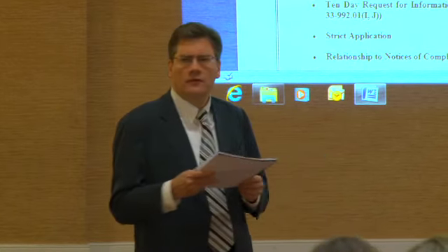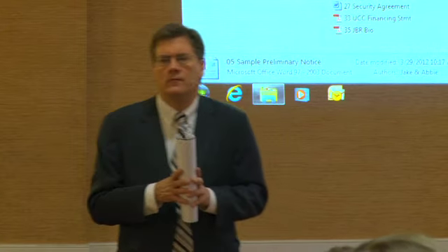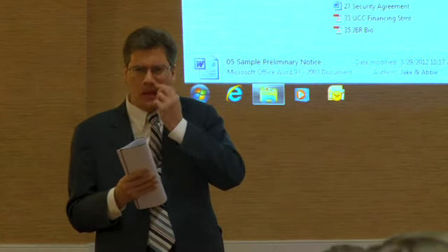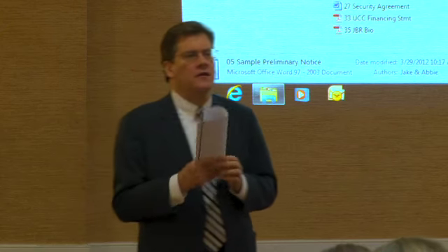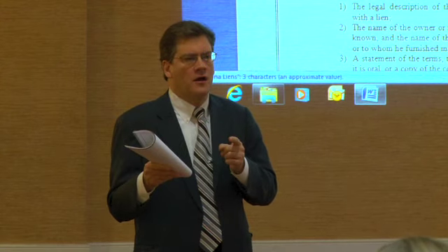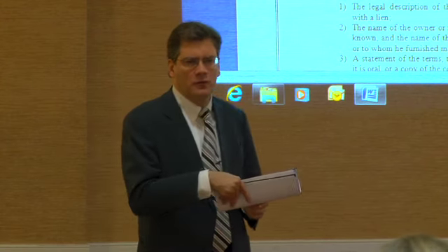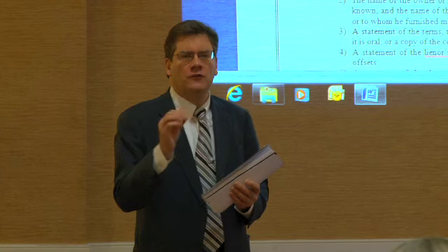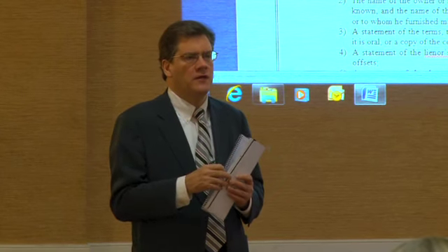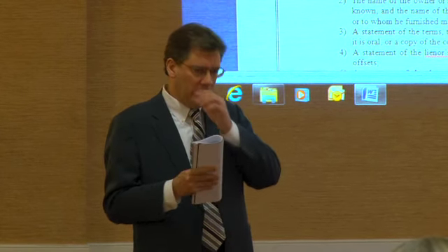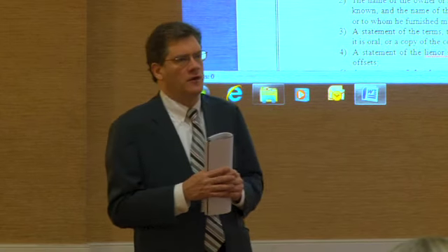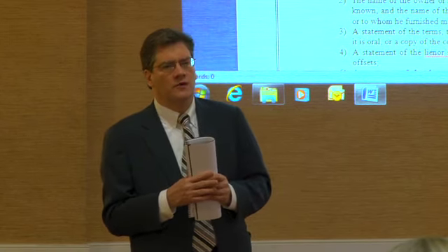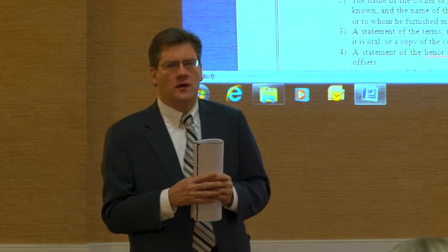Jim? Yes, sir. What about a public project? Do you still have to put an amount, an estimate in the prelim for that? Yes. And the thing that you need to be aware of in Arizona is for state public projects, you've still got to do a preliminary notice unless you're in direct contract with the owner entity. Okay? And in that instance, the only parties in direct contract with the owner entity are generally going to be general contractors.